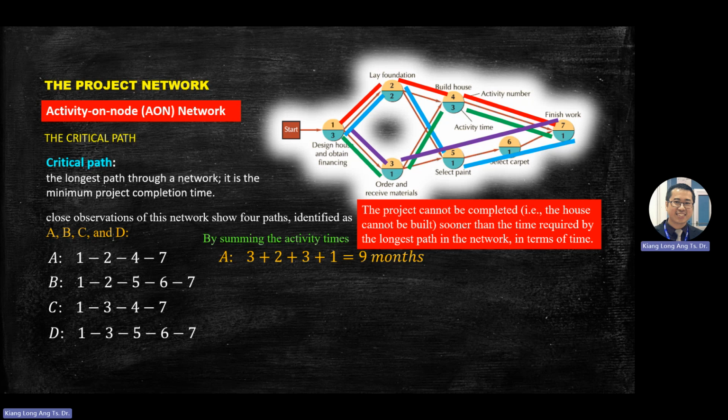Okay, so this side is more on the path activity. Then you do a short calculation there. You can draw a short line here. Then you calculate time. So for example, activity number 1, you need 3 months. 2, you need 2 months. 3, you need 3 months, 7 months here. You copy from here. Okay, then you calculate, it's 9 months. Right?